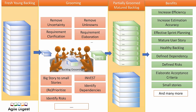What is the benefit of doing grooming? The efficiency of the development team increases. By doing continuous grooming, we mature our estimation — our estimates become more accurate going forward. If you are in sprint one right now, after sprint six your estimation will be more matured, and that comes from continuous grooming. Your sprint planning will be more effective — you don't need to groom stories, clarify unknowns, or find cross-functional availability at planning time. You mature your user stories and make your backlog healthy.